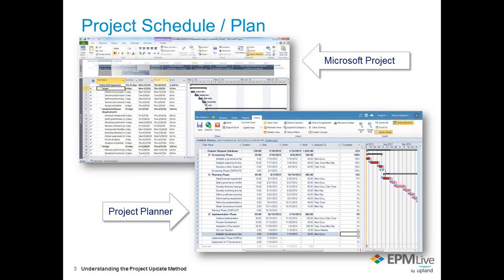But if you're in manual method, whatever values that you have entered into the project form or view form, also known as the control page, will remain intact. Once you change it to a schedule-driven option to update your method, then the values that you put into your Microsoft Project schedule or the online project planner will override those values in the view form.